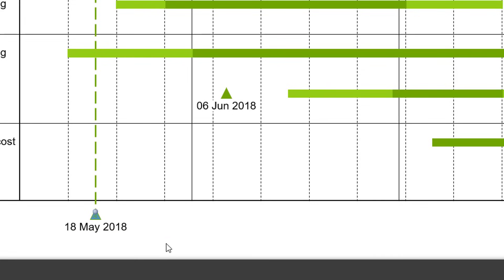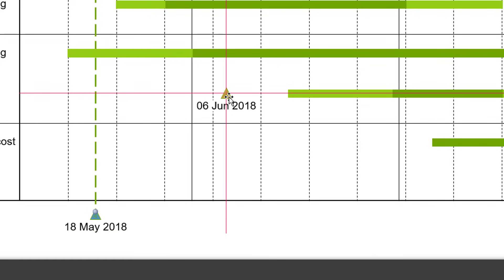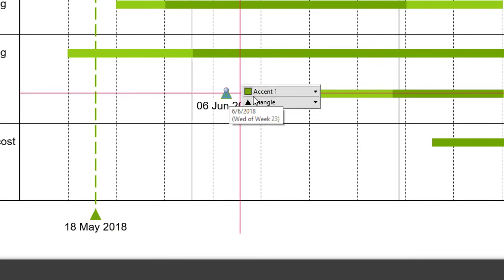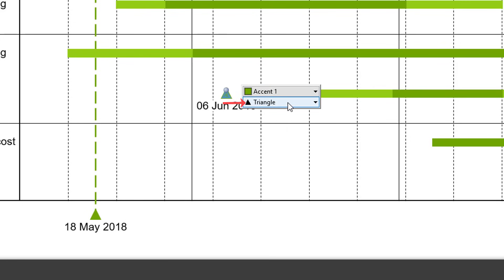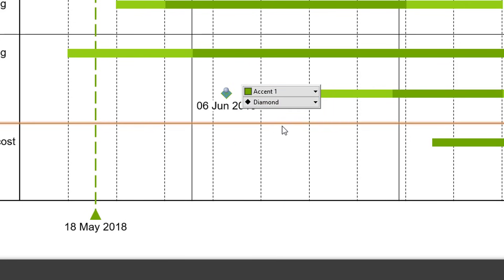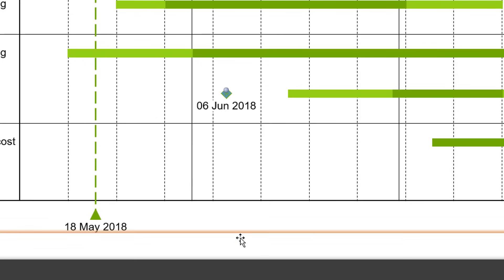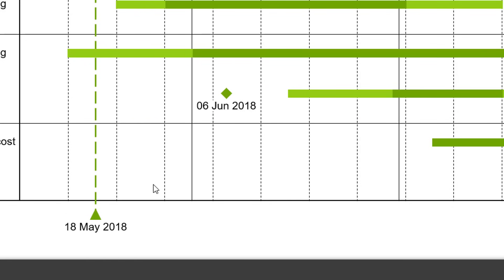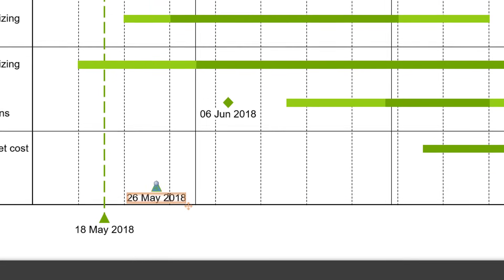If you want to change the shape of the milestone, left-click on it and select your preferred symbol from the drop-down menu — for example, diamond. Now let's add some more milestones to your chart.